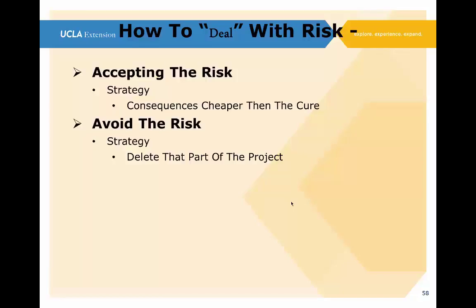In other words, how does our system and their system work together? How smoothly does it work together? Are there any issues, any problems, anything of that nature? The customer wanted us to also be responsible for the response time, how long it took for these actions, from when a system did something, or they changed a control or changed an input or something like that. They wanted us to be responsible for how fast the total system, including our system, responded and carried out the action. That was really not a part of our scope.